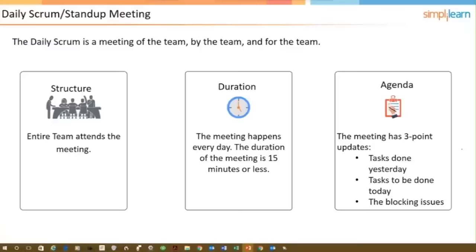Duration, 15 minutes. We talked about that. And the agenda, what did I do yesterday? What am I going to do today? And what are my impediments?